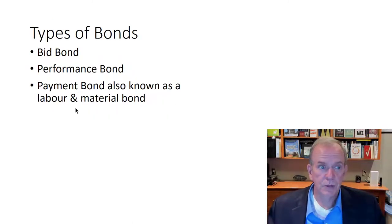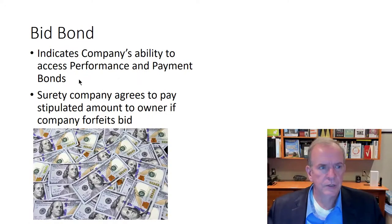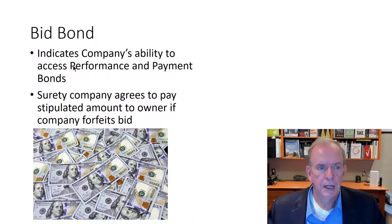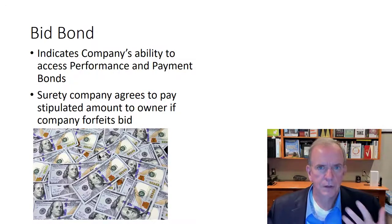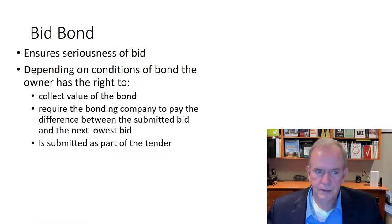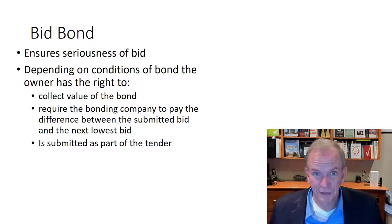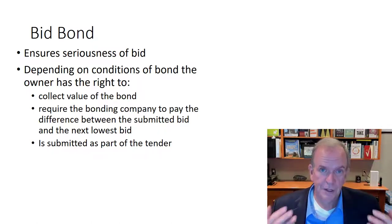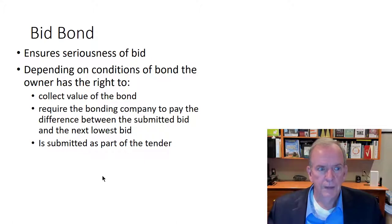There are actually three types of bonds. The bid bond indicates the company's ability to access performance and payment bonds — the surety company agrees to pay a stipulated amount to the owner if the company forfeits the bid. It ensures the seriousness of the bid so people aren't playing games. The owner has the right to collect the value of the bond or require the bonding company to pay the difference between submitted bids. It's submitted as part of the bidding process — what some people my age still call the tendering process.